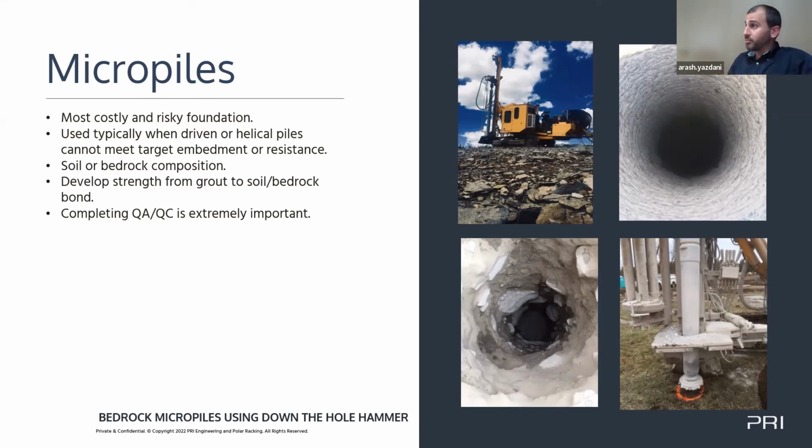Presence of groundwater too. Presence of groundwater, yeah, absolutely. Collapsing soils. Water or tremie or concrete. Tremie, yeah. And we're talking real specialized construction methods all of a sudden. In the dead of winter. In the dead of winter, we did, yeah. One site is 26,000 bedrock micropiles. Like that's a lot of rock drilling. And yeah, when you hit water, it just adds a whole other ball game.